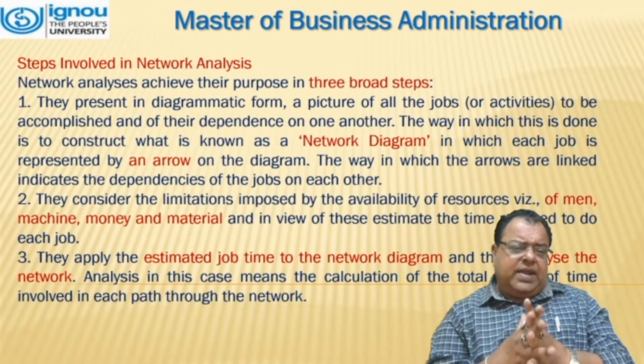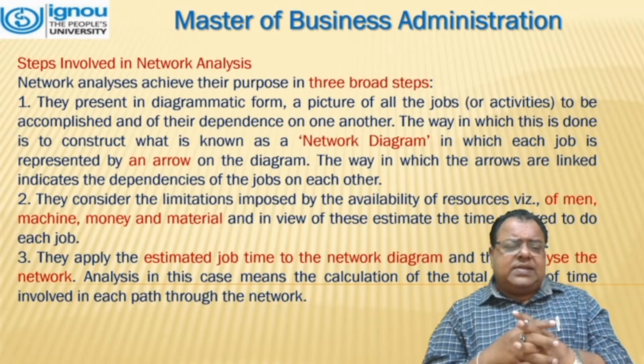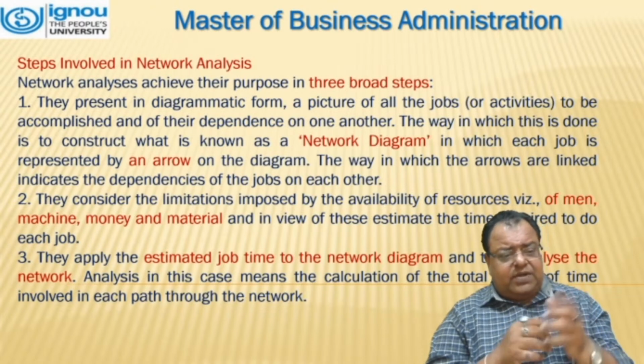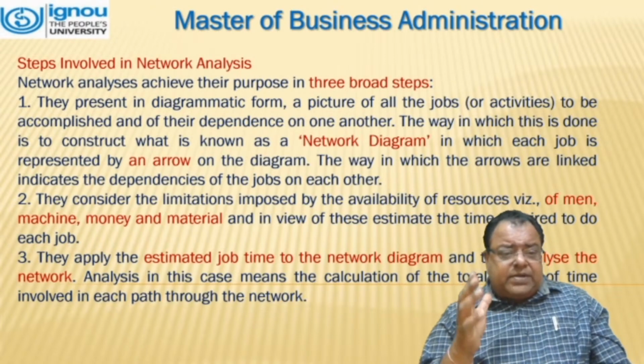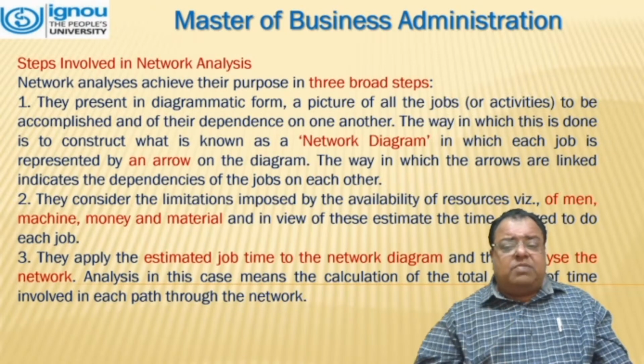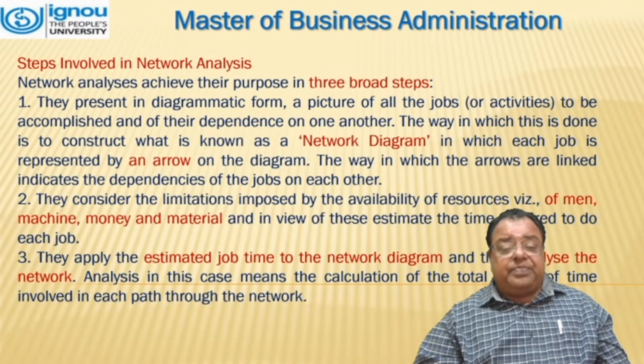Steps involved in network analysis. Network analysis achieves its purpose in three broad steps. First, they represent in diagrammatic form a picture of all the objects or activities to be accomplished and of their dependence on one another.